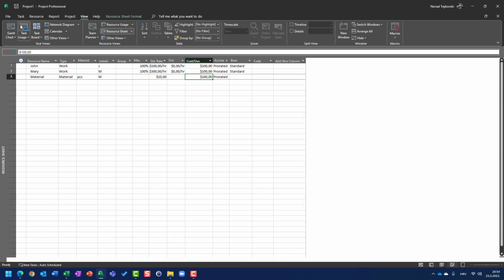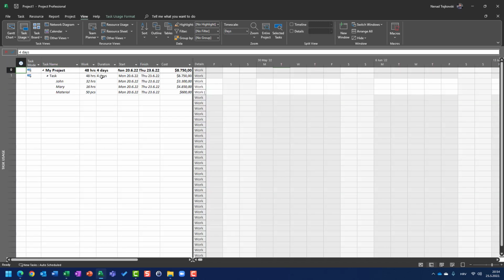To prove that to you, I'm going to say 1 day. Okay, 1 day, it's 8 hours for John. 8 hours multiplied by 100 is 800 plus 100 cost per use. 1 day for Mary is 4 hours. 4 hours multiplied by 300 is 1,200 plus 50% of cost per use, which is 50.